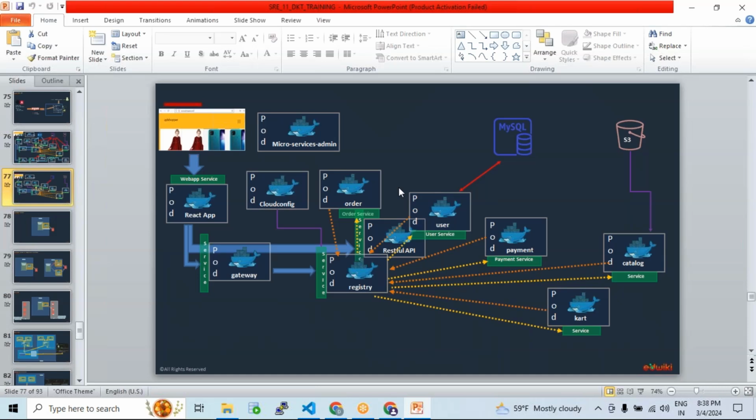So today let me talk about that planning perspective, at least certain high level details that help you understand how exactly things will be planned in real time to deliver this. At a high level, can I call out a few activities, guys? Let's say today is the very first day for your project and nothing is already there. Then you need to spend some time preparing the AWS infrastructure, preparing the Kubernetes infrastructure, configuring the required IAM roles, installing Jenkins, and setting up the pipelines. I'm just trying to call out certain tasks that you need to deliver, correct?